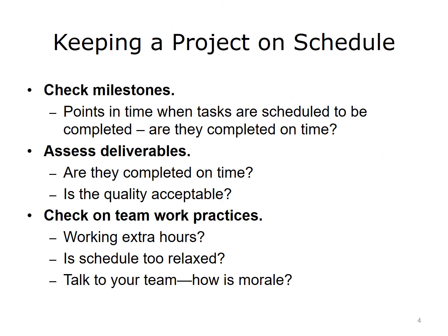This slide presents a number of activities to help you keep a project on schedule. First, check milestones. When you planned your schedule, you should have inserted milestones or points in time by which specific tasks are to be completed. If your milestones are being met, your schedule should be well on track. Secondly, assess the project deliverables. Are they being completed on time?